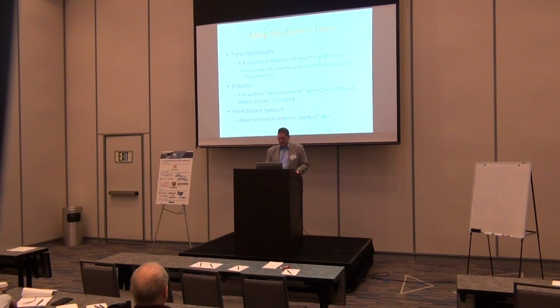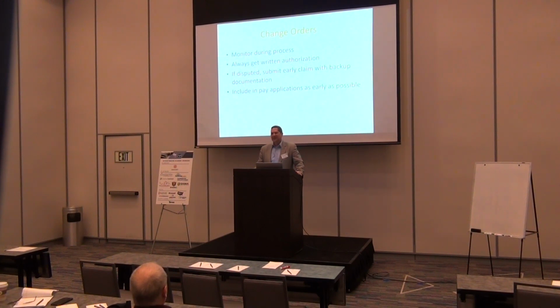So I won't bore you with how you do that, but basically you have to get something filed, and then you have to file a lawsuit within a certain period of time after that. Kansas, it's 12 months. Missouri, it's 6 months. That's why it's fun being on the state line.